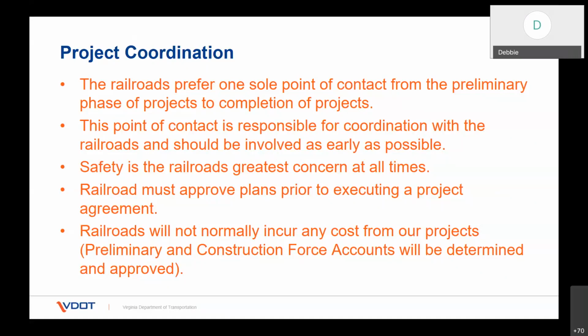Railroads will not normally incur any costs from our projects. Having said that, whenever we have a project around the railroad, any time that they expend on your project, even for reviews or anything, you're going to have to pay for that. There are force accounts that will be created with your project. The first, a force account.